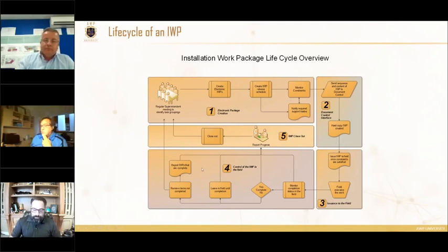Being able to control it through the life cycle and record what the craft actually did do is key. They ask for what they're going to do, then they do it, then we record what they actually did and record any changes or deviations. That's all part of the installation work package life cycle that's extremely important at the craft level for integration with them. There are a couple of key things in bringing those people together. I know I'm harping on that, I harped on it in the path of construction. It's not an isolated planner in a single environment. It is a collaborative environment where these gates need to be met.